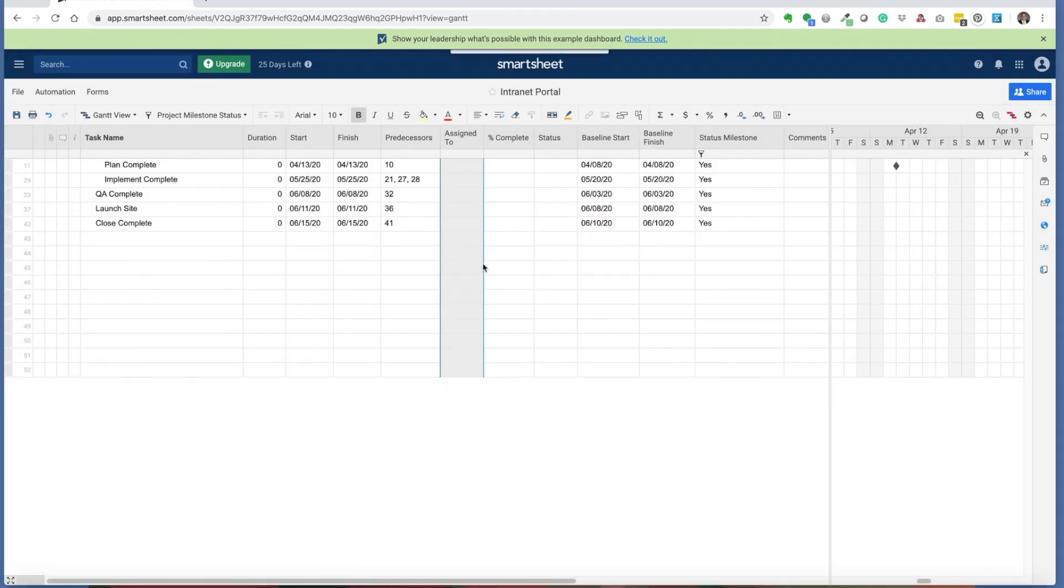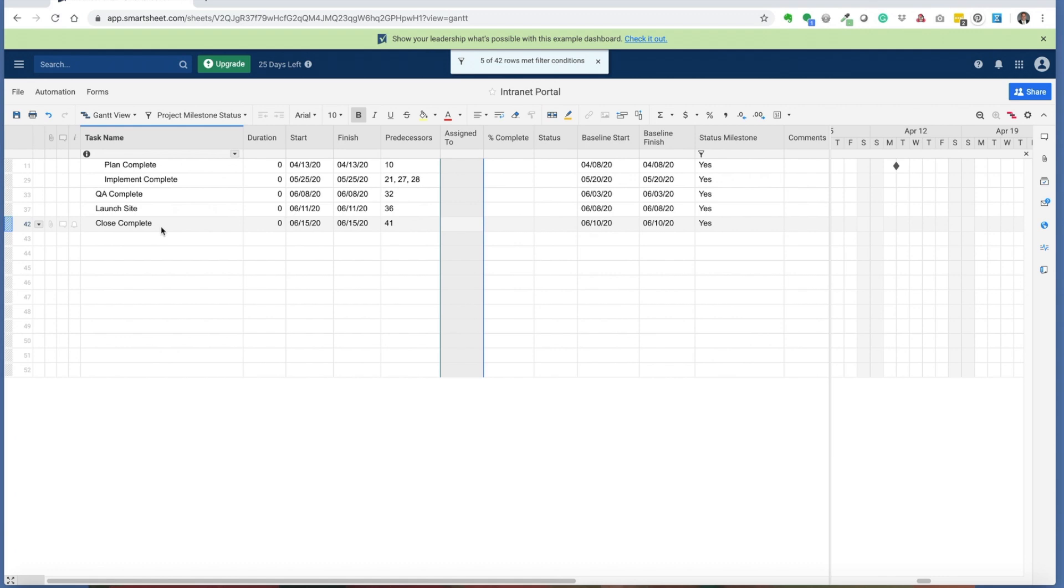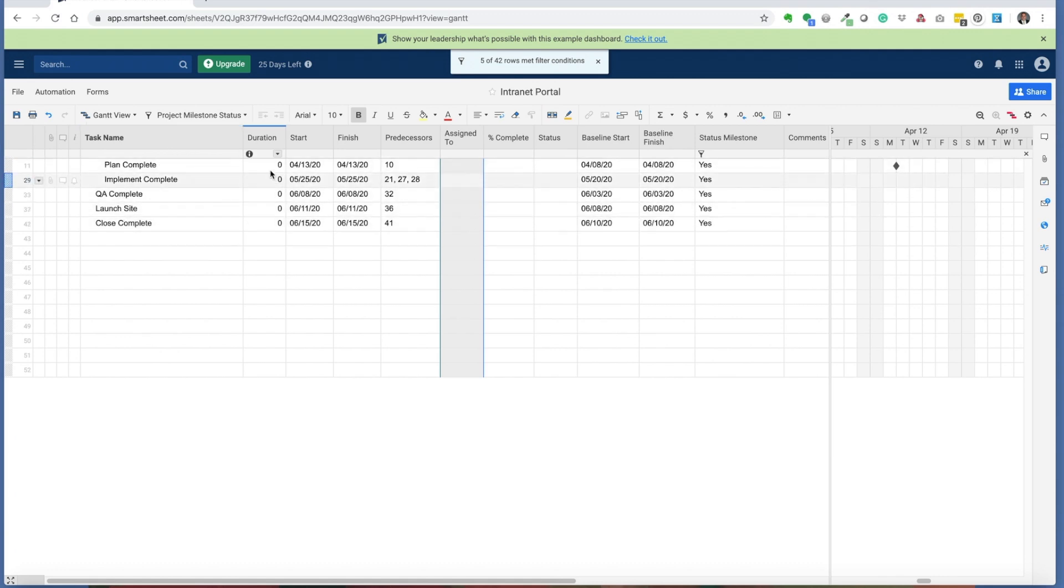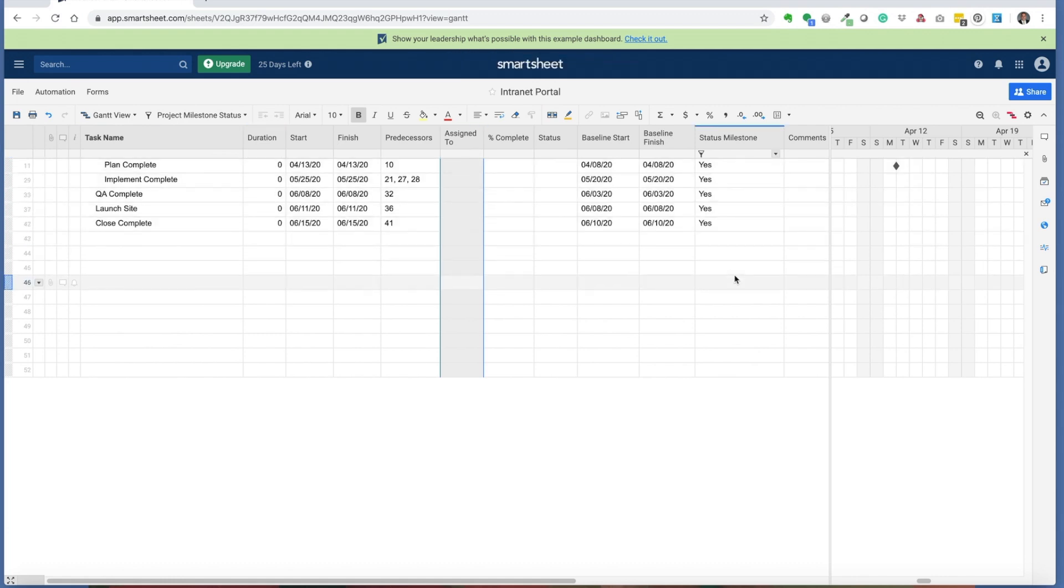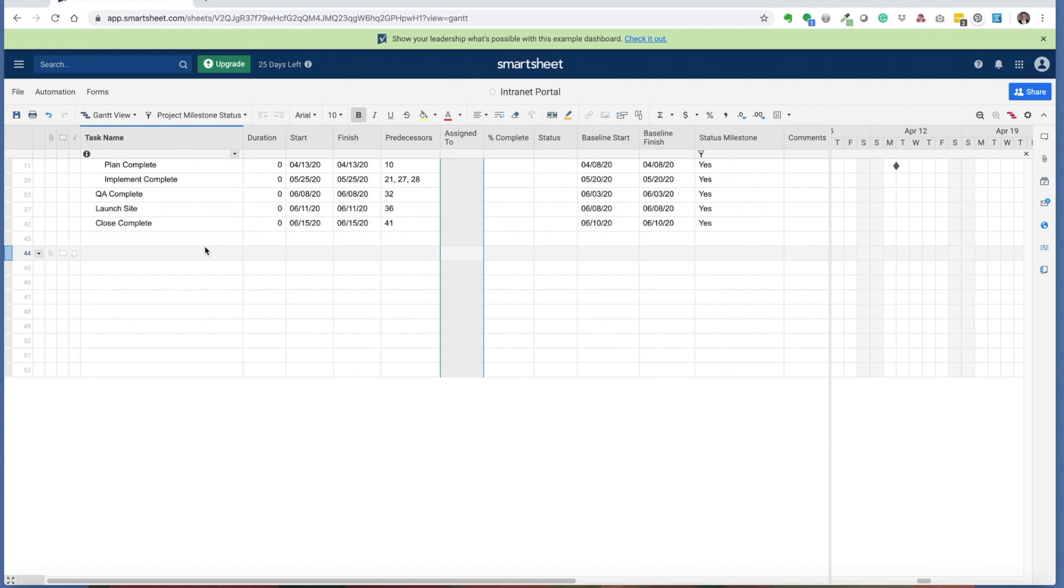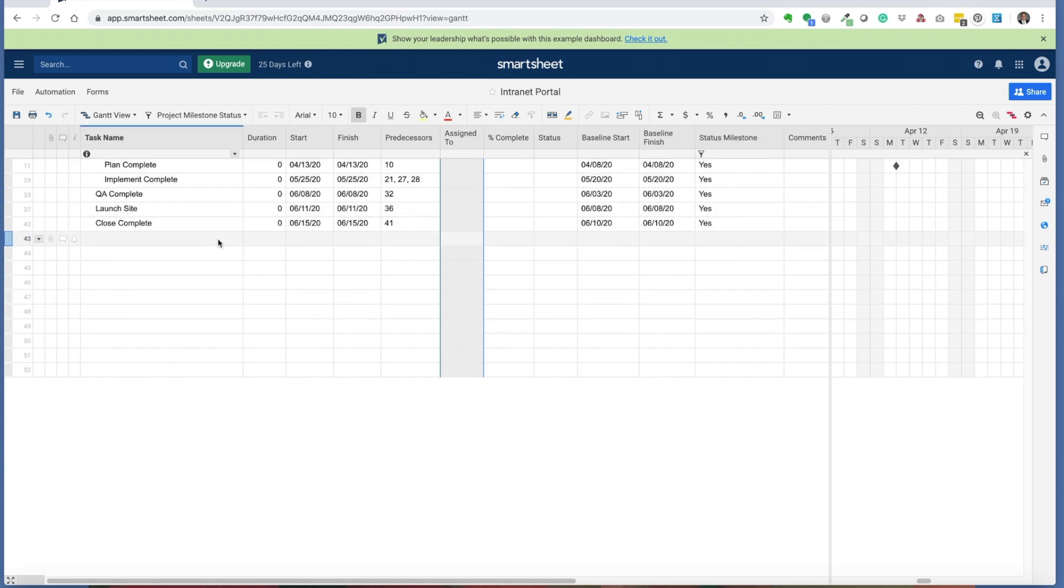By using this filter, I'm able to focus on only the milestones that I want to share with my stakeholders via the project status report, even though they have a zero duration. Now technically, any task that you flag with a yes would appear in this filter or in this report mechanism. But this is one effective way to call out milestones that you want to share on a status report versus the ones that show up with just a zero milestone duration.